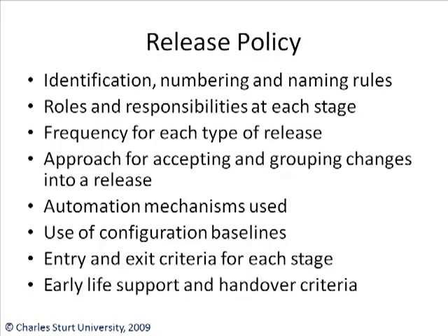We need entry and exit criteria for each stage. So when do we move from development to build? And when do we move from build to test? And when do we move from test to deployment? We need also a couple of statements on early life support. How, when, where, you name it. And also handover criteria. So at some stage there's this cutover point where the release is no longer part of service transition. The release is now part of service operation.